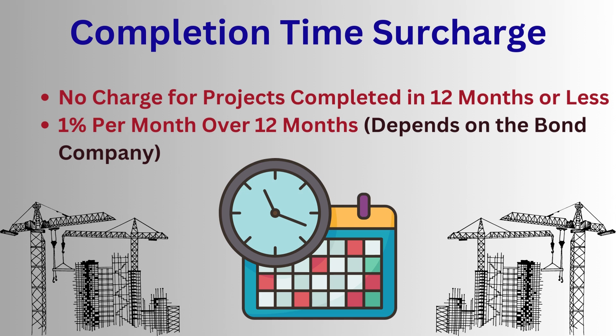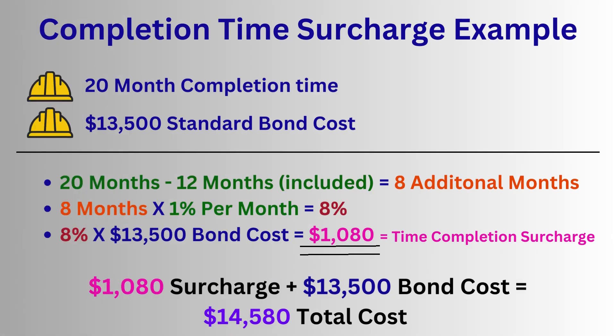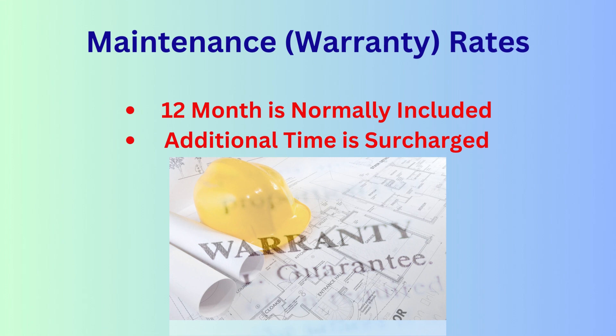Another factor that can impact performance and payment bond cost is completion time. Long-term projects create more risk, so standard rates apply to projects completable in 12 months or less. Projects taking longer are subject to a time completion surcharge, usually 1% per month for each month beyond 12 months. For example, if a project takes 20 months, subtract 12 to get 8 extra months; 8 months times 1% equals 8%. Applying 8% to our $13,500 premium gives a surcharge of $1,080, for a total bond cost of $14,580.